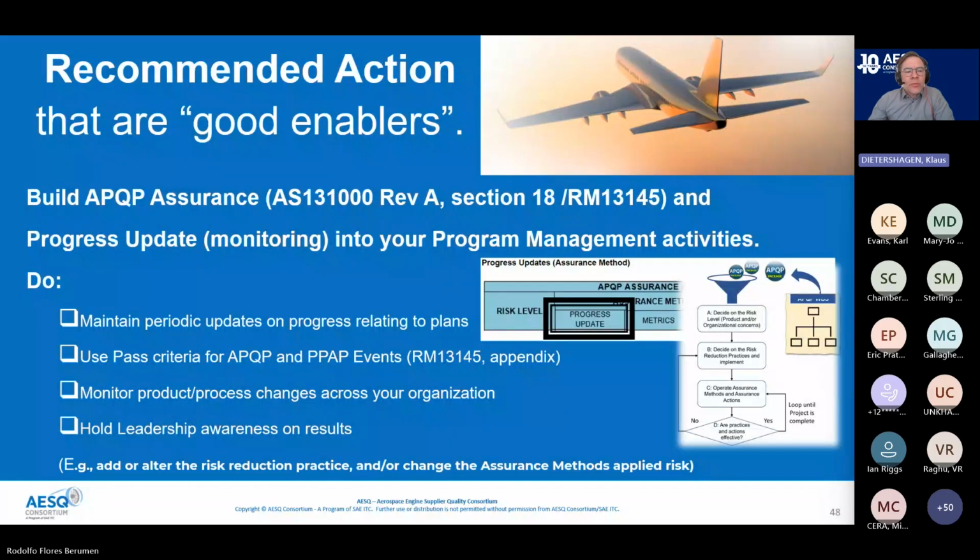So we have the confidence when we go through the pass criteria in every one of the phases, then we fulfill the APQP project assurance. And so this project assurance is a kind of matrix, depending on what risk level we possibly have for our particular evidences, and so it's organizing those reviewing and monitoring. Of course, we can't do those monitoring on our own. We need to involve the participants as well as the project owner, but very important is to involve here the stakeholders, yes, to get those different views for the monitoring.